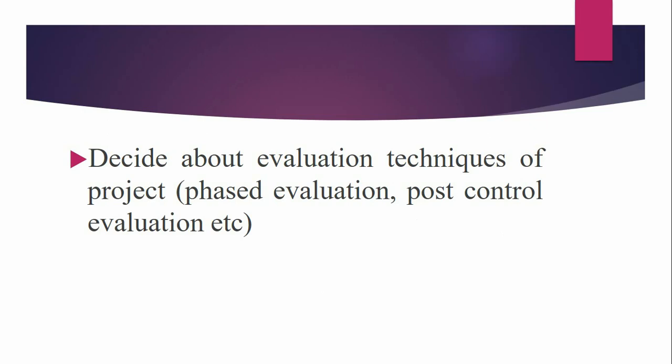If yes, then move forward. However, if the project is of a very short period of time, you may use the post control evaluation technique, that you have completed the project and then check whether we have done very well or not. So it depends upon the decision of the manager.